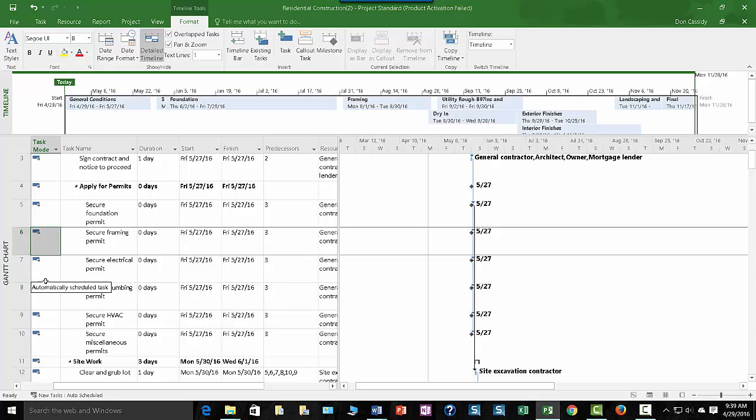It really has to do with the fact that you don't want to limit the schedule for a specific task. You don't want to do that, because otherwise the task doesn't become free-flowing. When you make changes above or below, especially above, all of a sudden you have this task scheduled for a certain specific time. It throws off the entire schedule. It makes it more complicated.